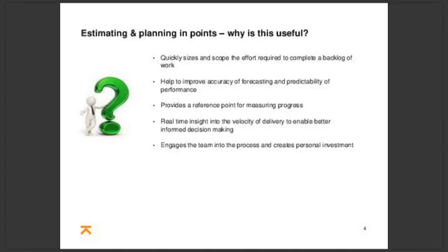And in turn, it can also be used to forecast and reliably predict the future performance of your team. By knowing how many points a team has managed to complete in a certain amount of time, you can then apply this to your planning and decide what amount of work a team can get through in the future. This can avoid the problems of over or underestimating.